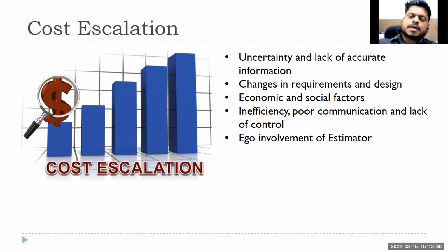Okay, why don't you keep a backup server also? The IT team might come and say, okay, sometimes we do maintenance work, so why don't you keep a backup server to hold the data whenever maintenance happens? But if that requirement has not come in the beginning, putting in a backup server, additional work there, will cost that team additional manpower, additional effort, additional money, right? And that is where the conflicts happen. Who is going to pay that money and how is that going to be managed?